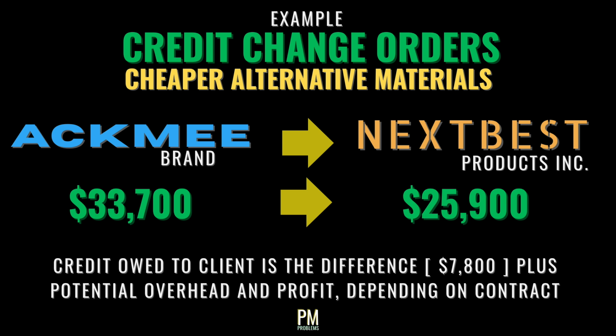In the wake of the 2020 virus, many materials were not available, and in kind, some clients were willing to accept a cheaper substitute material in their place. Our subcontractors had to provide a credit for the difference in material cost, which would be passed through us as the GC to the client.